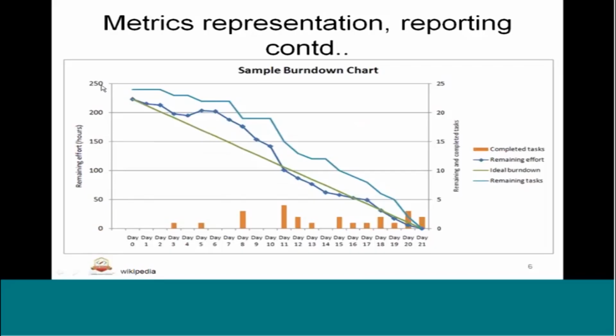I will start from the left hand side with the total number of allocated hours, and as I progress my hours are going to decrease. Accordingly, the tasks are also expected to be reduced, so that many tasks we have reached, and when we are left with near 0 hours, our tasks should also be reducing on the downside. That is how this burn down chart will be prepared.